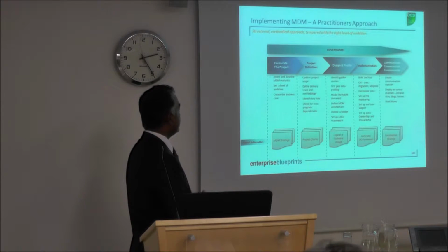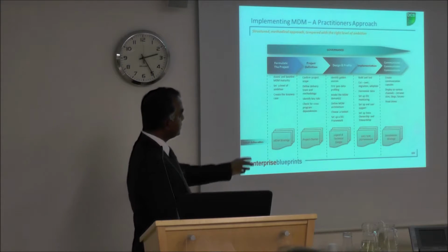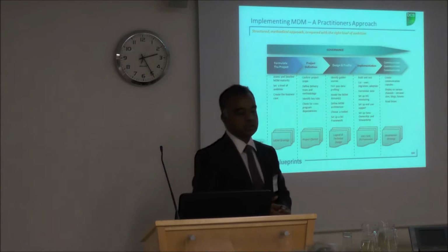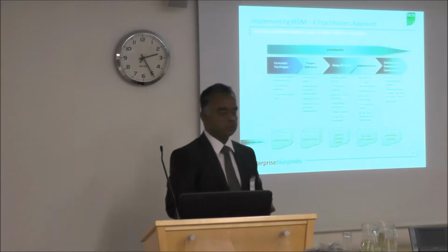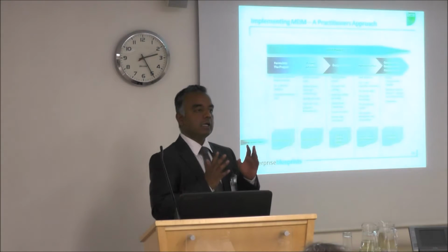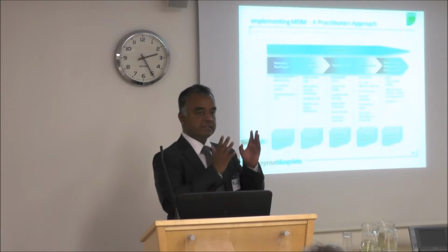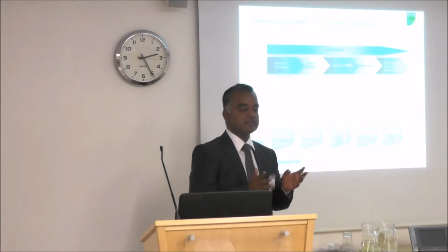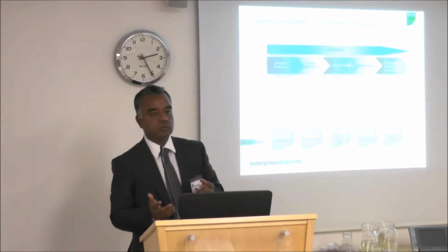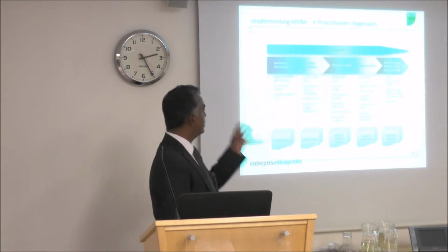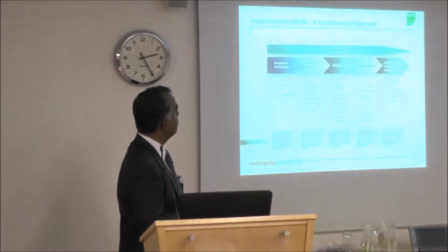You obviously start identifying key risks. So this is standard project management 101, and you come up with a project initiation document, differently called project charters, or a project formulation document, different things. But this is basically where you have said, I'm going to deliver an MDM project, this is the scope, these are the business benefits that I'm aiming for, these are my risks as I see them now, obviously more and more risks will be presented, and this is the way in which I will deliver this project. So simple project management 101.